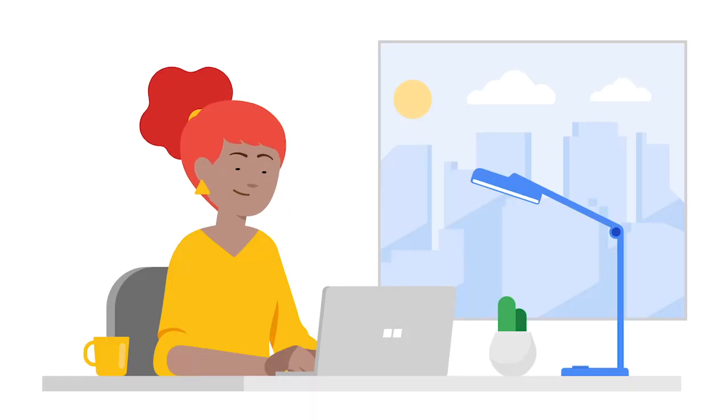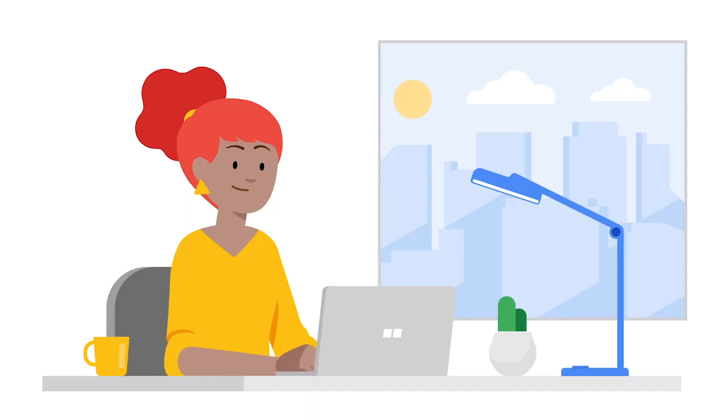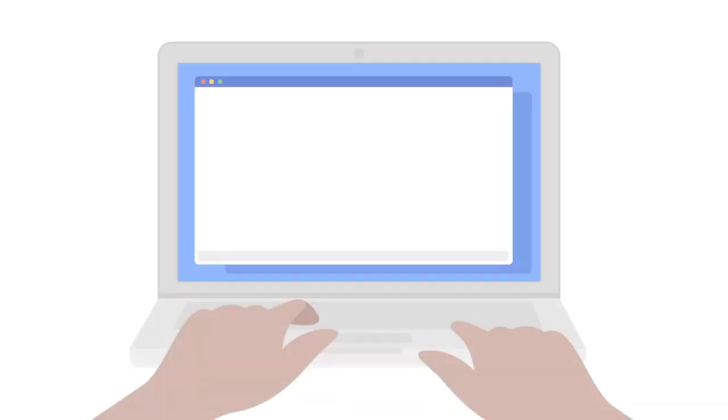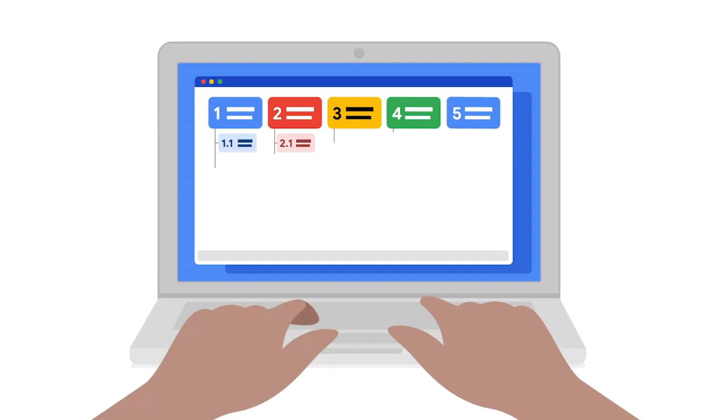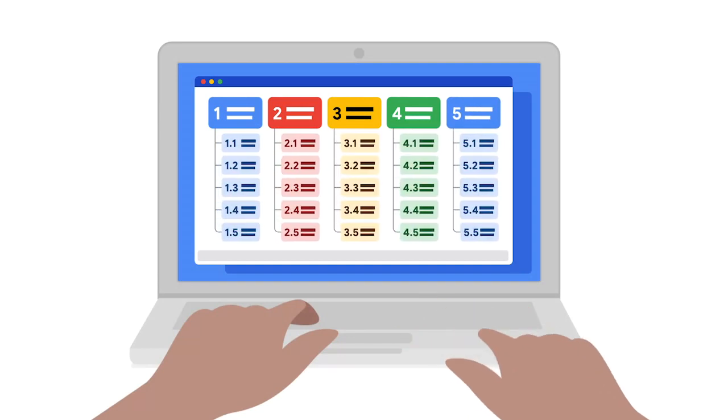By now, you should have a long list of project tasks. To finalize the list, review what you have so far. Check for any remaining larger tasks that could still be broken down into smaller subtasks, and add those tasks to your list. When you think you've listed all the necessary project tasks in your project plan, the next step is to arrange the tasks in the order that they need to be completed. Determining the proper task order will help you assign start and end dates for each task.